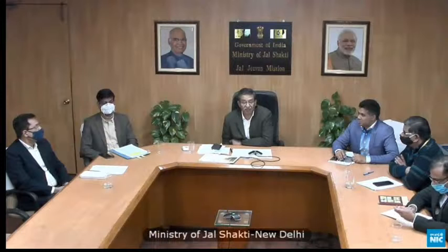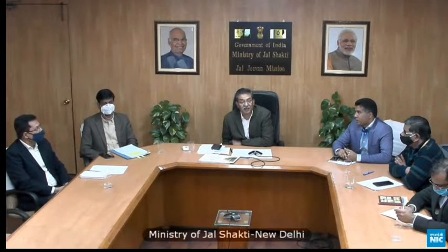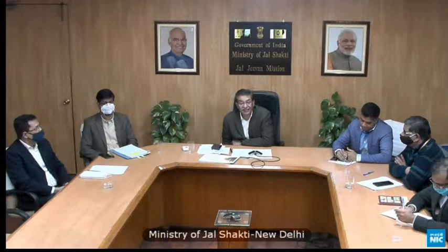We have 5-6 days left. I think if everybody goes in a big way, the daily average, I am saying, 1 lakh connections are uploaded on this data. But our need is for 6 days, every day 6 lakh data need to be updated. So if you can improve your work and give this campaign mode for the next 6 days, data entry is done for household connections,